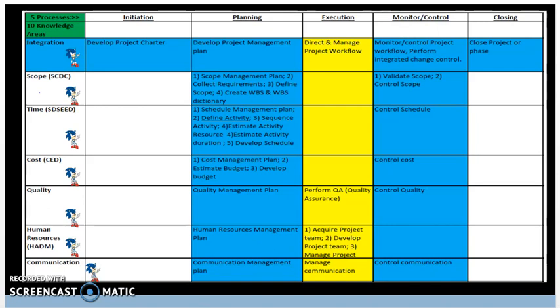Previously we had discussed the quality assurance process, which is a proactive approach taken by the project team to ensure internal processes are followed to achieve the customer's desired quality in the product, service, or result. In contrast, in this process, quality control or control quality, this is a reactive approach done with the end client, where once a defect is found during the walkthrough or inspection, that means we as a software development team, let's say in an IT project, will have to patch the software to mend the bug. This is not a desirable outcome as it indicates the process was not audited for gaps accordingly. So control quality is the next process after performing quality assurance.